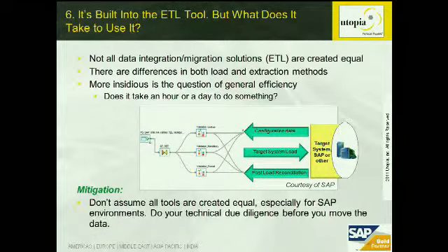and it's to focus on the issues and the decisions that must be made, because every time you're moving data all day long, business decisions and requirements are going to be foisted up through the business process owners, and someone needs to understand and make those decisions in a timely manner. And if they don't know they're responsible for that, you're going to cascade schedule slippage all throughout the project because you're waiting on Susie Q to come back from vacation to make that decision that she never knew she had to make. All right, so the next one here.